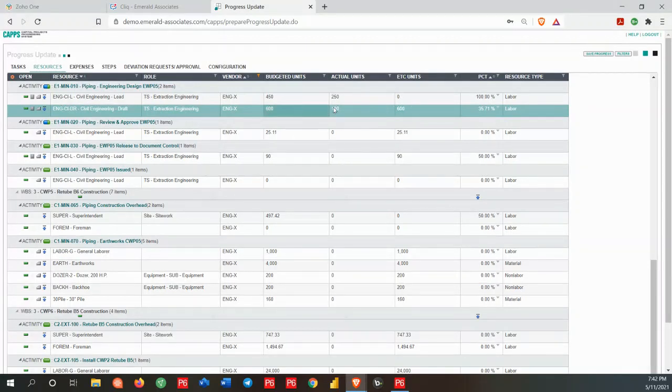This one has 600 hours. We've done 100. Well, maybe we've done half of that. Again, we can forecast that down. It was trying to hold the 100 plus the 600, the 700, but I can definitely reforecast that as appropriate. Maybe I'm going to do a little bit better on this one too. So you can go ahead and do those updates.